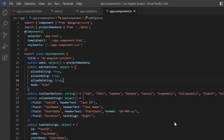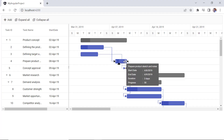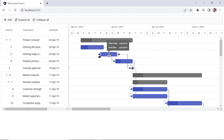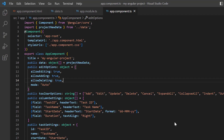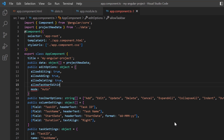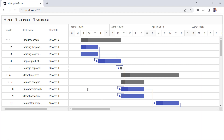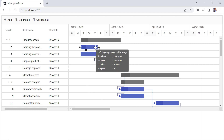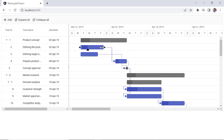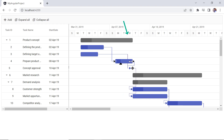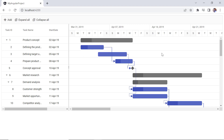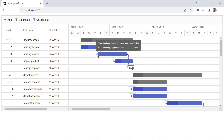Now, I'll show you how to perform editing in the taskbar. I can modify the task details by resizing or dragging the taskbar. To enable this feature, I add the allow taskbar editing property and set its value to true. When I place the cursor over the taskbar, the kebab menu is shown. I can change the start and end dates of the task by resizing it. If I change the dates in the child task, it will be reflected in the parent task. I can drag the taskbar to change the dates, and I can also edit the dependency connector lines using drag and drop with connector line points available on either side of the taskbar.